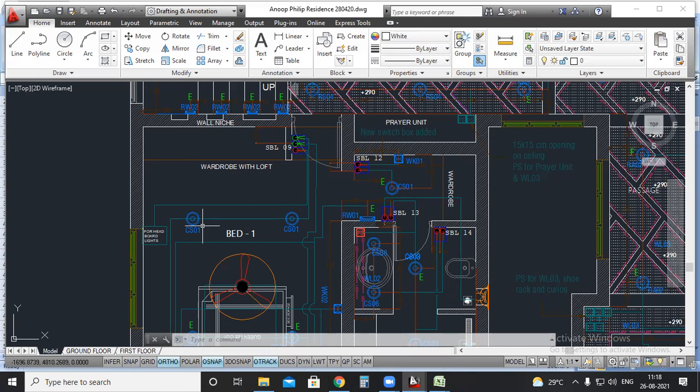If you take this bill of quantity to a shop, the shopkeeper will not be able to understand the details, because we prepared it for taking proposals from a contractor, like supply, installation, commissioning, one switch, one light, one point, varying details. To take the materials from a shop, we need to provide the material quantity or bill of material. So for this project, I'll show the material quantity.